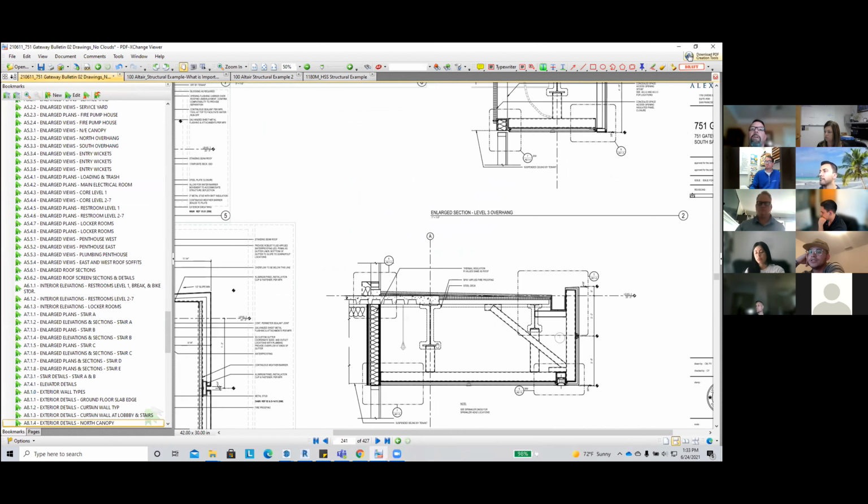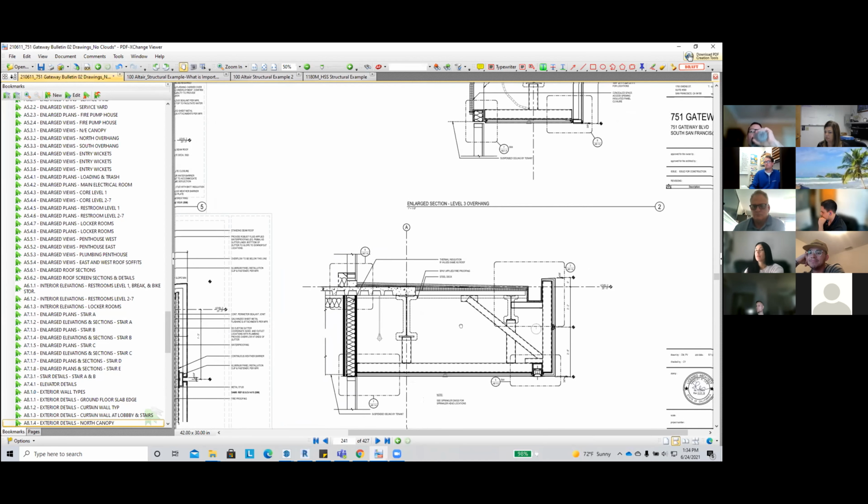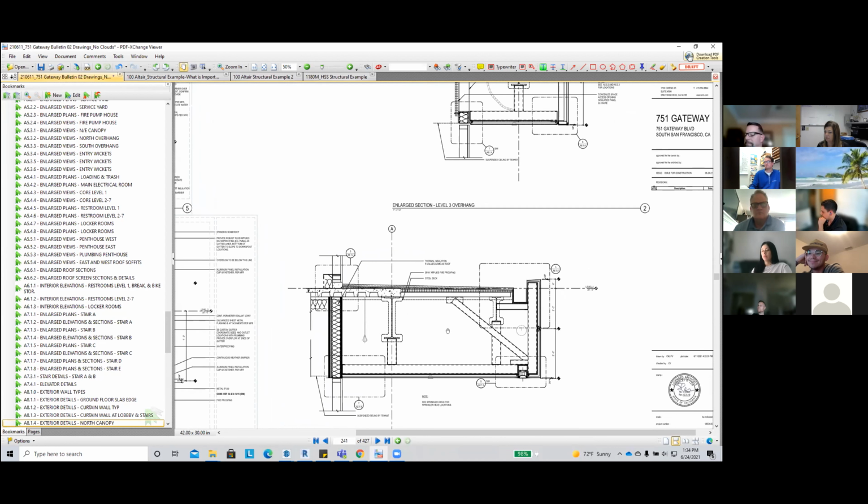Yeah, especially because our shop drawings don't really mean anything to them, because the contract documents that we're bound to are the structurals and the architectural. So if we show a different size, even if we put a note that tells them to verify it, it doesn't matter. Right. Exactly. You gotta RFI everything.